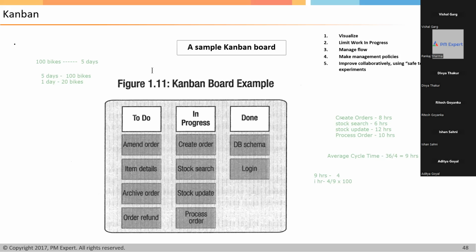So, the average amount of time to complete WIP, what is this? A cycle time, right? Cycle time is the average amount of time you need to complete a WIP. Is that okay? So whatever you complete in unit time is called throughput, right? So you have a formula, WIP is equal to cycle time by throughput, right?